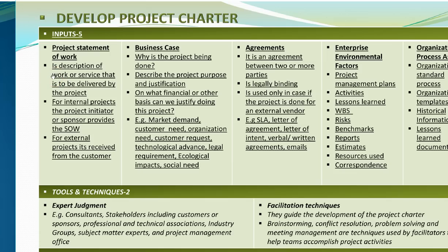Now, who is the person responsible for providing the statement of work? For internal projects, it is initiated by the project initiator, or most probably the sponsor who provides the statement of work. But when it comes to an external project, it is received from the customer.